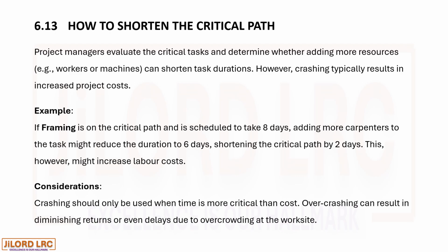Considerations. Crashing should only be used when time is more critical than cost. Overcrashing can result in diminishing returns or even delay due to overcrowding at the work site.